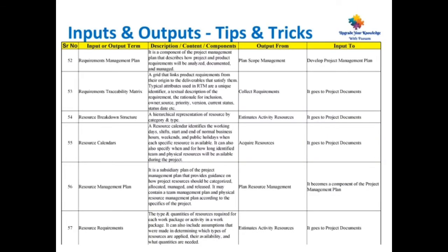Coming to slide number 1, point number 52, requirements management plan. It is a component of the project management plan that describes how project and product requirements will be analyzed, documented and managed. This is the output from plan scope management and input to develop project management plan.